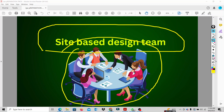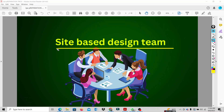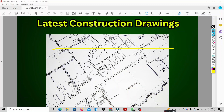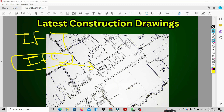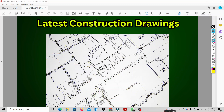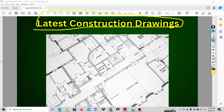The first step is we are going to reach the design team. We are going to get information — specifically the latest construction drawing. We know the different drawing types: IFT means Issue for Tender, and IFC means Issue for Construction. The latest construction drawing, which is the IFC, is very helpful and important.